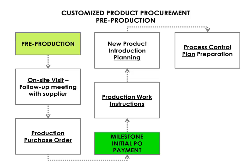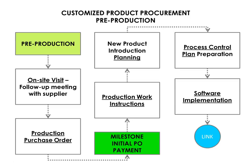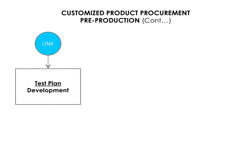Every manufacturing process should have a process control plan, and this is something you need to generate in conjunction with your supply partner. In some cases, there may be the need to implement software at the supplier's factory or the need to implement a process that involves using new software — now is the time to implement this. Every product needs a test plan that clearly identifies what needs to be tested and how it should be tested, along with the frequency of tests. Your test plan should also state what actions need to be taken if test results fall outside the limits you have indicated.